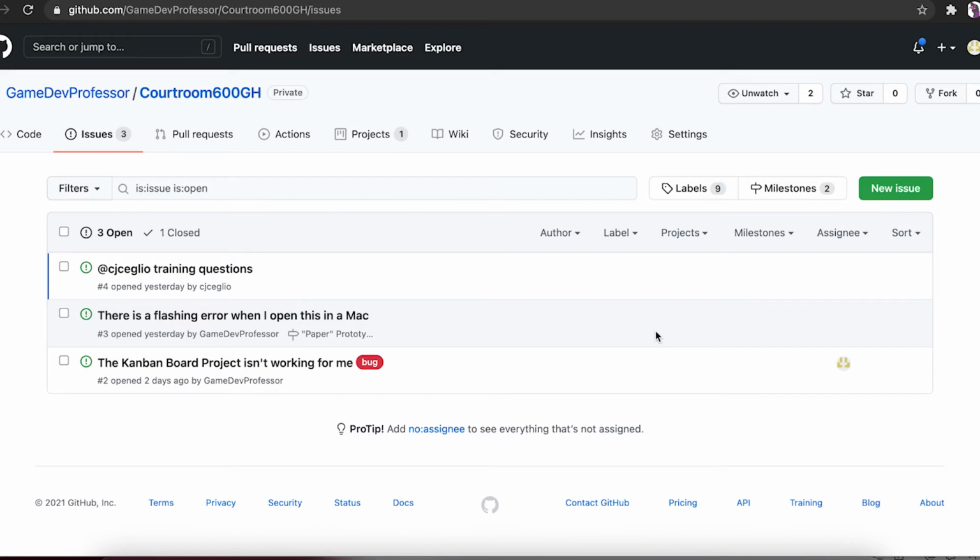You can actually check it off, and it allows you to have a conversation about which issues need to be resolved, and also have a chain of custody when you're resolving those issues. So for instance, if there's a producer who assigns tasks each day, maybe all the tasks need to be routed through their desk and through their username, so that from there they can hand them out.